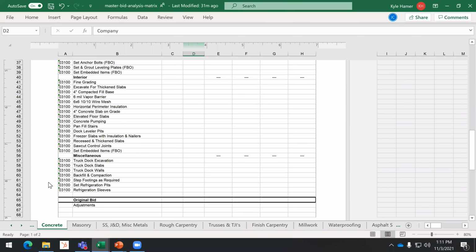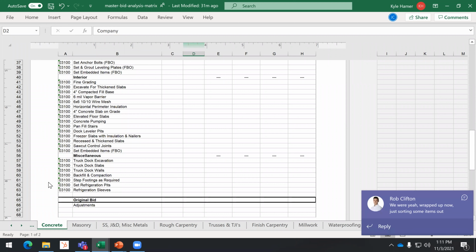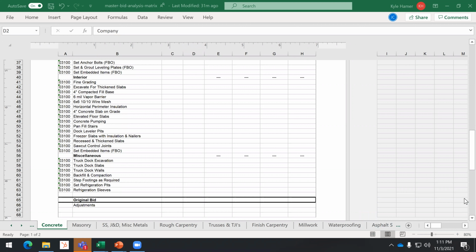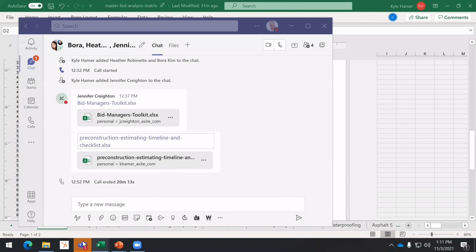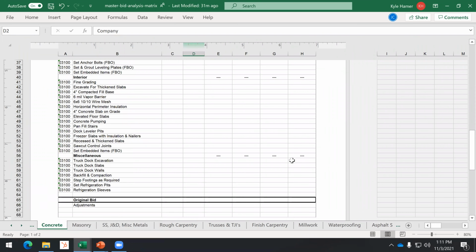Yes, it's a pain, but our recommendation is to have that scope of work for every trade, for every project, and you will reap the rewards. Not only does it help you with your bid day activity, but it allows you to get into the subcontracting activity. You win the job. Now you've got the scope already decided. You've talked with each vendor about the scope, and it makes it easier for you to write their subcontracts versus just taking a bid and looking at the guy's scope of work and it's $300,000 and he says electrical. So you need a little more detail than that, obviously.